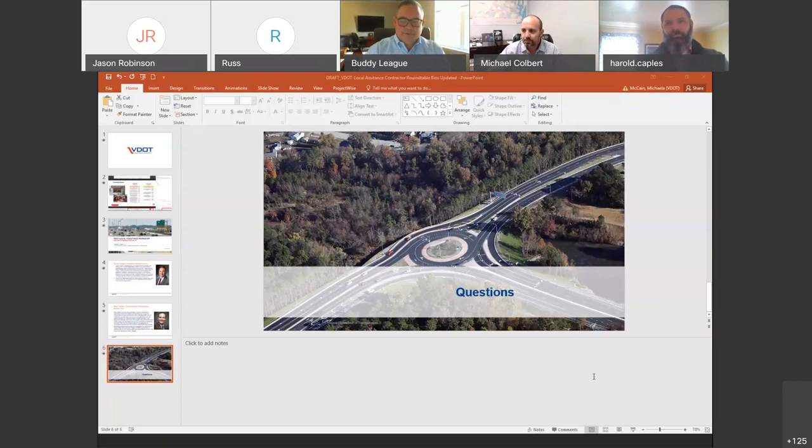Retention is, when you consider that you're paying whatever percentage the contractor's bond rate is, the contractor is paying that amount for that bond. And really our margin is where we would capture any extra cost of retainage. We anticipate the cost of that money to be for however much retainage is going to be left out there for however long. Some localities that do charge retention are better than others at getting that punch list done, getting the project closed out and getting us the money, but others are not.